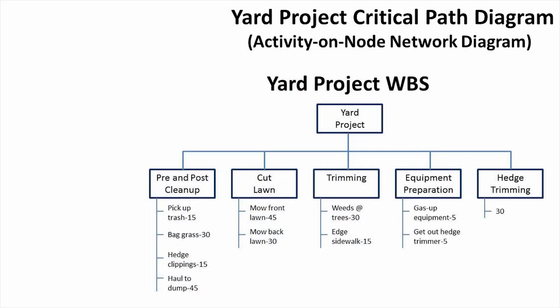That's what our work breakdown structure looks like for our yard project. Now, to the network diagram. The first step is to decide what can be done first, and sometimes it's possible to start several different tasks at the same time — if that's the case, you simply draw them side by side and start working from there. Looking at our work breakdown structure, we see we're going to have to do some pre-cleanup before the actual mowing of the lawn, and we have to do some equipment preparation, so these two tasks will be part of the first things we do.